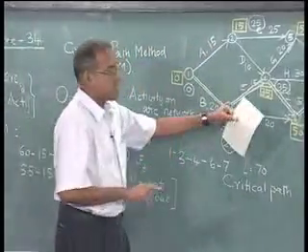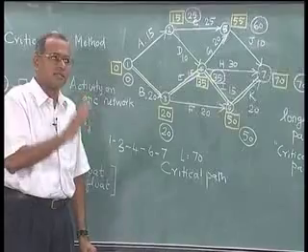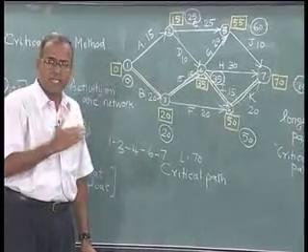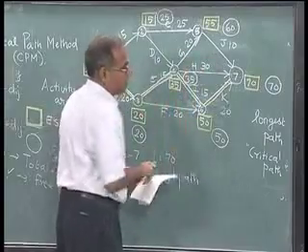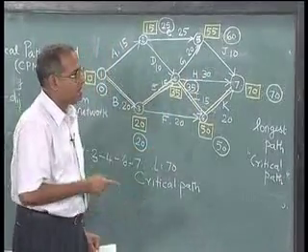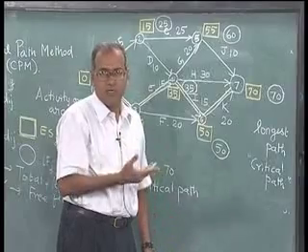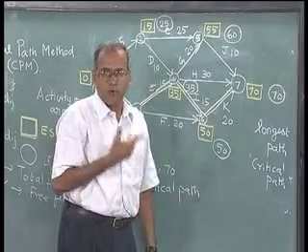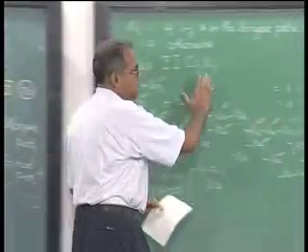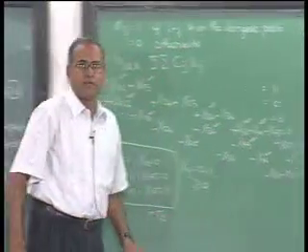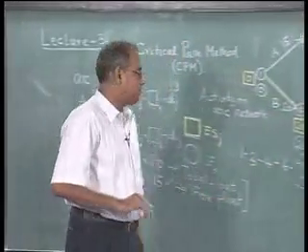The circumstances are very important. The network is made up of arcs such that arcs go from i to j, j greater than i. If we are able to do that, then this problem can be formulated as a longest path problem, and this particular longest path problem can be solved optimally using a polynomially bounded algorithm whose optimality can be proved by the primal dual relationships that we have shown here. So, this is how we solve the longest path problem.